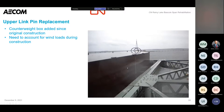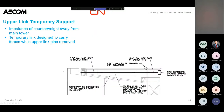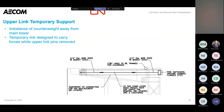Therefore, if we're going to pull those pins out, we wanted to make sure we were holding that load and not allowing the counterweight to rotate and distribute uneven loads on the needle beams. We came up with a simple concept: chains wrapped around it with chain binders to pull it tight. On top of the counterweight, the counterweight post comes up, wrap around that at the tower side, go around the top of the tower, pull it tight. Then we can relieve the force in these pins, pop them out, rehabilitate them, and put it all back together.